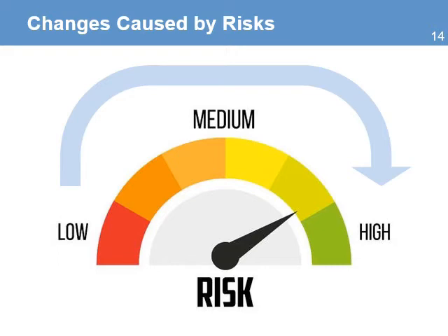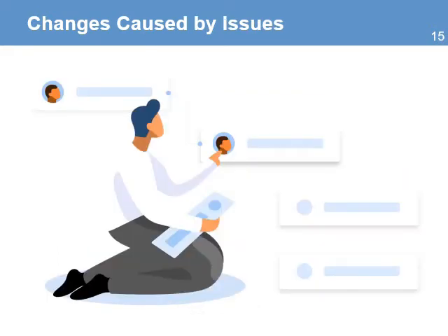When a risk occurs, it becomes an issue. An issue is an event or condition that has already happened and has impacted or is currently impacting the project objectives. Issues occur all the time, and the solution will require resources that in some cases are not readily available by the project. For example, a delay in the project requires a solution to work on two activities at the same time, but that will require hiring a consultant since there are no team members available to do that extra work. Issues can cause changes in all project constraints and on all project plans.